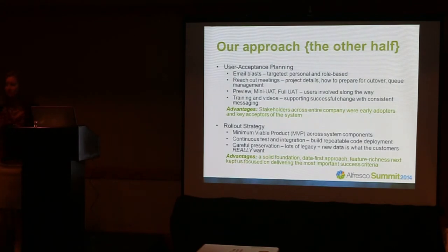We gave them a set of rules that said, this is how the new submitted is going to work. These are our goals, this is our success criteria, and they could be hand in hand with the team, with email blasts or with reach out meetings. Troy here went across the world teaching people how to test the system and provide us input. So we did previews, we did mini UATs before we did a big bang UAT near the end of the project.